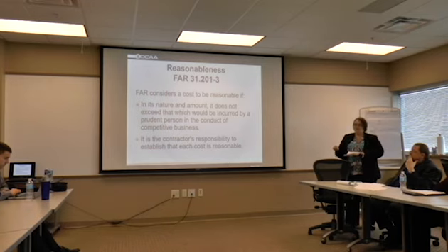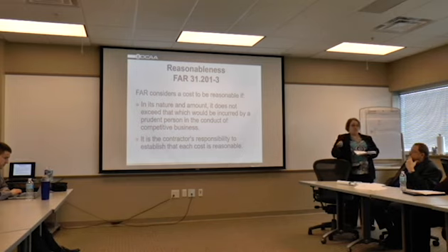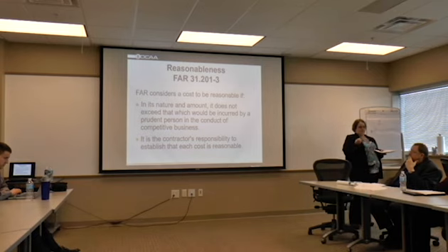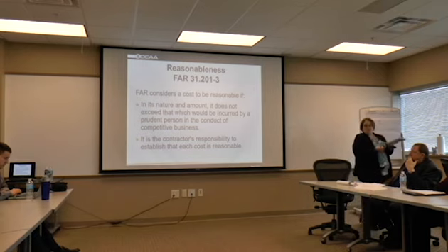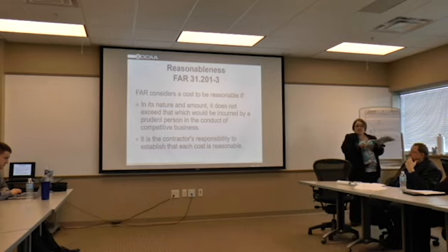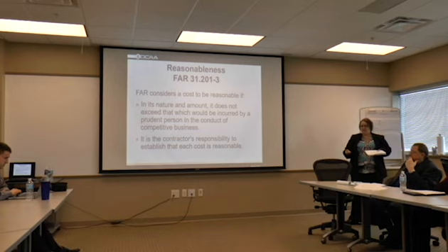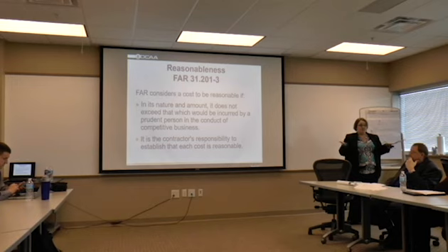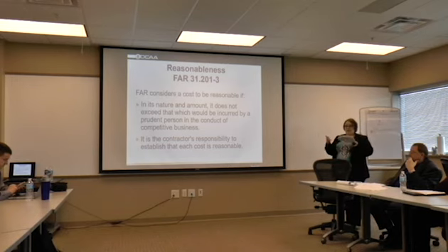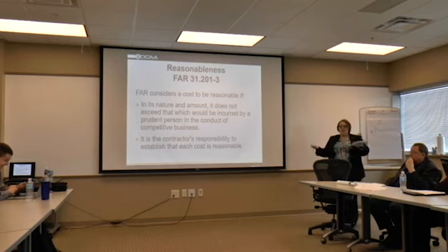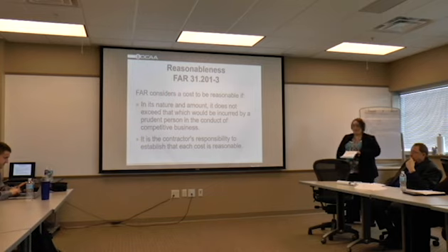So escalation in the proposal environment is where I see a lot of times that we're questioning based on reasonableness. We're going to look at what you have historically experienced. If you have some history of where you've purchased that material for the last 3 or 4 years, we're going to say, historically we see your escalation at 4%, what changed to make it now 10%? There are obviously situations that make 10% an absolutely reasonable amount of escalation. But we need to see that support and that judgment and rationale for how you arrived at that decision. So, does that make sense?